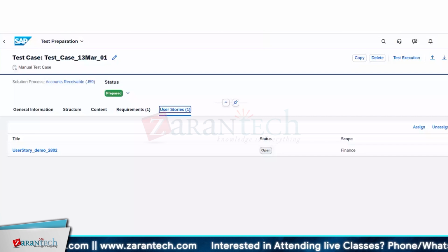Now we have developed something, right? And we left out some configuration functionally, even though the test can pass. That doesn't matter. When we verified it in the FUT, we didn't find it out. So that is one stage. Then we move the changes into SIT, and the test is done there too. That is a quality stage. Then pre-production, there will be a UAT phase with business users testing, depending on our test results. This is how the test is looked at in all the stages. Then we move the changes into production. These are the four stages, Ratan.